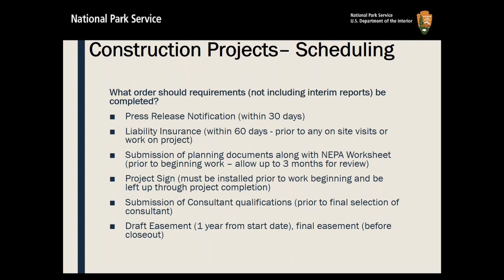Project sign has to be installed before you start to work, and then you'd want to submit to us your consultant qualifications. You're going to submit these prior to selection on your end. Don't wait and say to us, oh, I already chose them, because we may have some disagreements. The Park Service can pick the best qualified, not the least cost, unless that's your local procurement law.